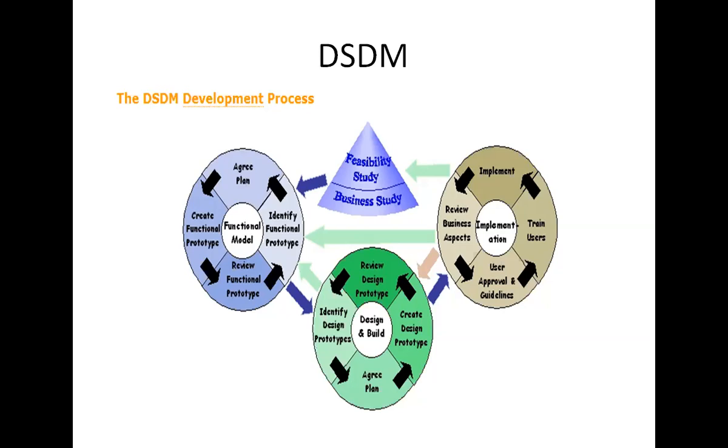The focus is on refining and studying the business-based aspects of the computer system. Then design, build, and iteration. In this, the product is designed and developed in iterations. In each iteration, a design model is made of the area being developed, and then that area is coded and reviewed.